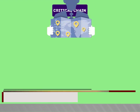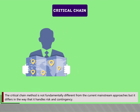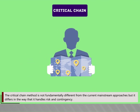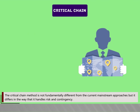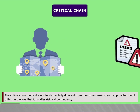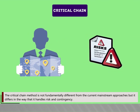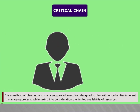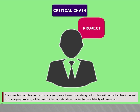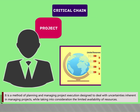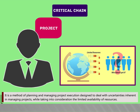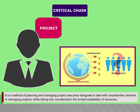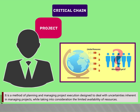The Critical Chain method is not fundamentally different from the current mainstream approaches, but it differs in the way that it handles risk and contingency. It is a method of planning and managing project execution designed to deal with uncertainties inherent in managing projects while taking into consideration the limited availability of resources.